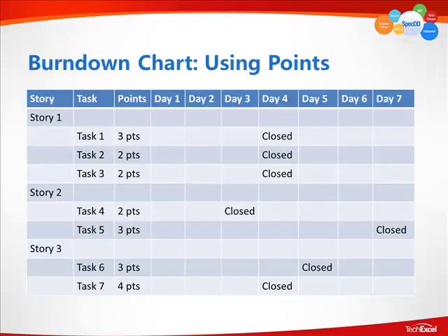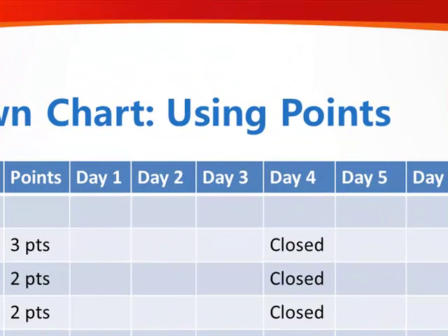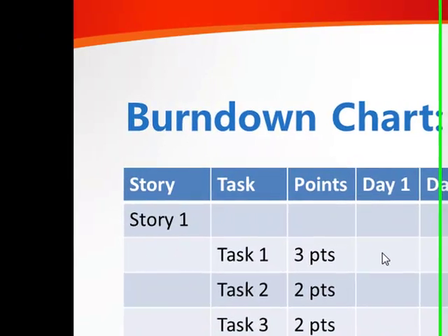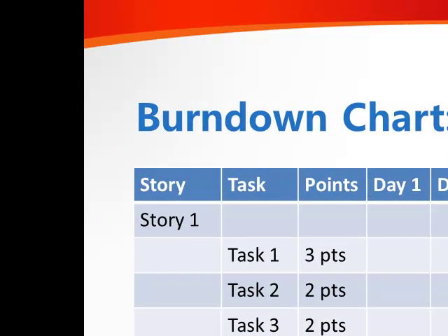Now, with points in Spec DD, this is different from time remaining. Time remaining, just to remind you, is updated every single day. It needs to be updated every single day in order to be effective, in order to help drive the team, and in order to be useful. Points, on the other hand, there is no need to re-estimate every day. There is no reason you start on day 1 with 3 points, on day 2 have to re-evaluate and say, okay, well, I did 1 point, and let's finish with 2 points.